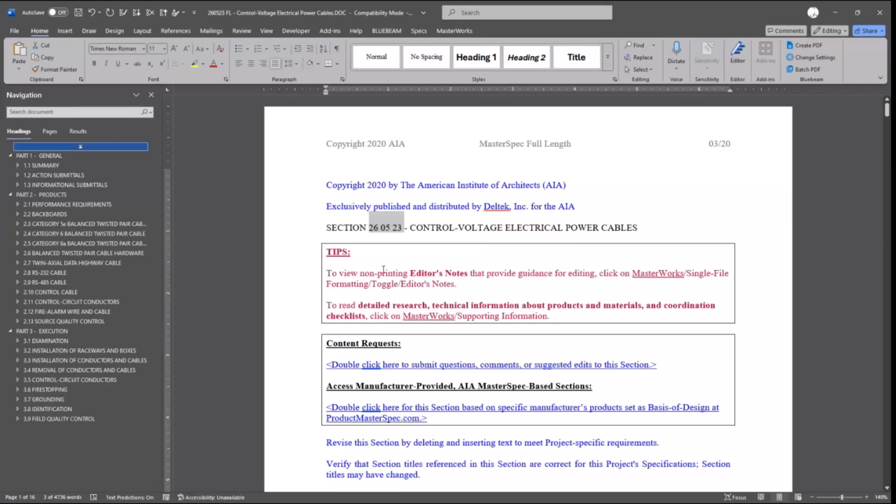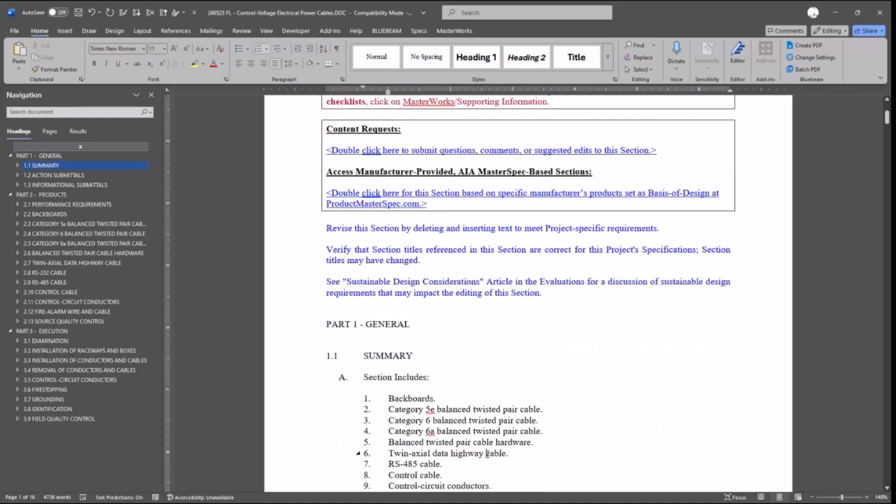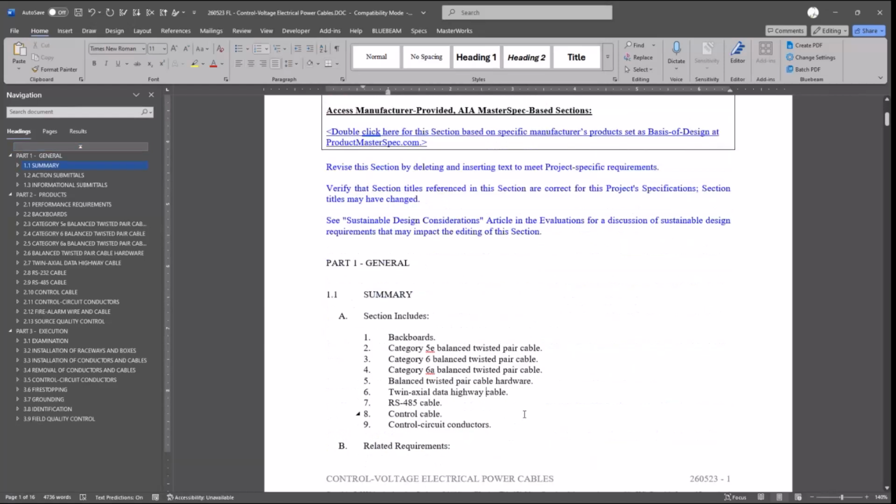Anything you submit after this has been approved is not getting approved, and they better figure something else out or send a revision, something to that effect. That's essentially what she is saying: everything should be under this header, this section, and subdivision numbers, period. And that's generally how I run my construction administration, unless it's some dinky little project where it's not going to hurt anything.